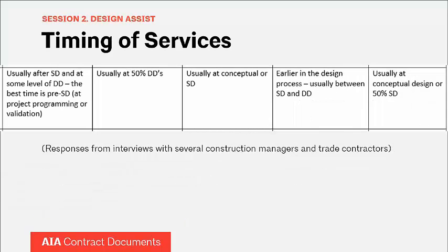One more thing before I get into talking about how folks get paid for design assist services and some of the pitfalls that can befall design assist services: another defining feature of design assist is that it happens well before delegated design typically occurs on a project. The folks that we talked to about design assist uniformly stated that design assist services happen during the schematic and design development phases while the design professionals are still working on their drawings and specifications. This is something very different than delegated design, which usually occurs after the design package has been completed.